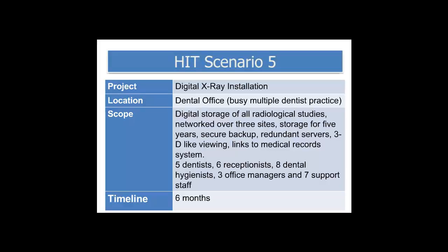One of the big challenges in this particular project will be getting the security right, because you're going to be networking 3 offices together over many miles. You're going to have the security there so that the system cannot be hacked, but also you need to think about security in a way of disaster recovery, so that if the system goes down, how can you have redundancy between the 3 offices? If the network goes down, how are you going to access those radiology procedures that may have been done at a different office? So those are 2 of the big challenges with this: your network security and then your downtime recovery.